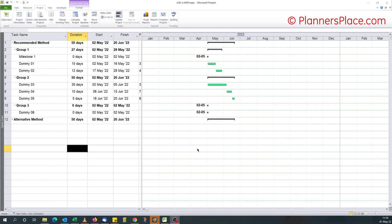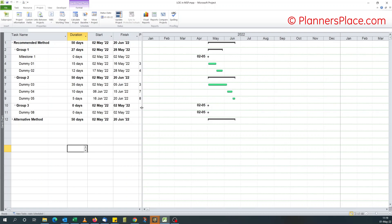For those of you coming from Primavera P6 to Microsoft Project, you will notice that we don't have a task type for level of effort like you do in P6 for hammocks. There are two ways of converting an activity to a level of effort task.